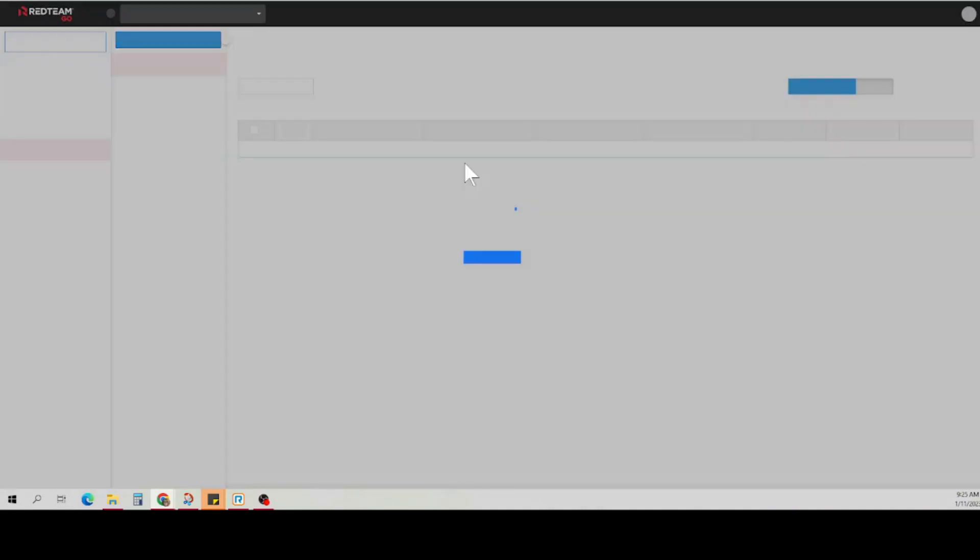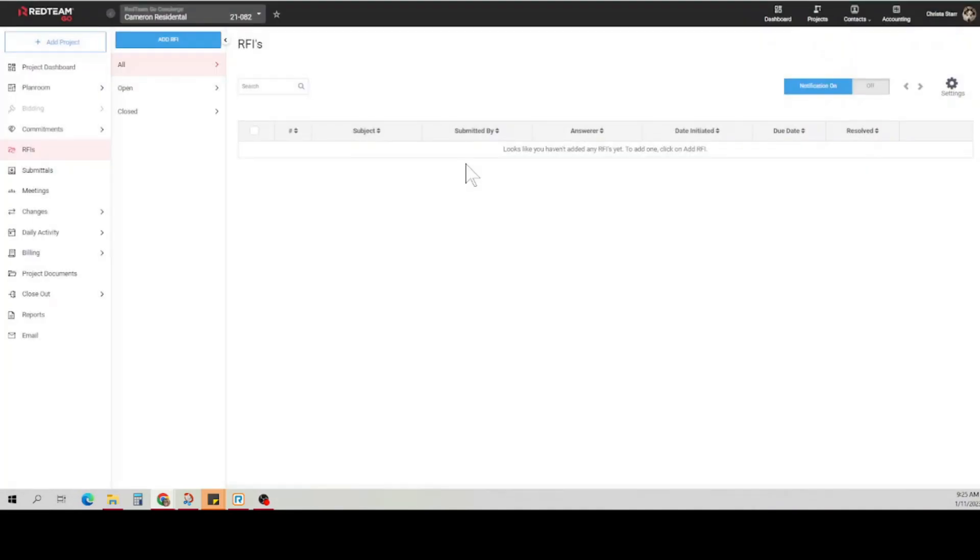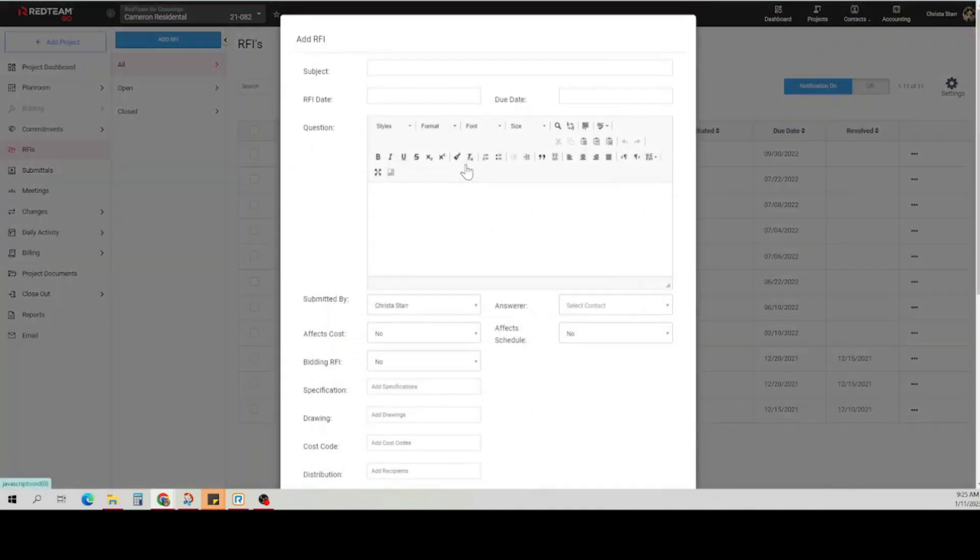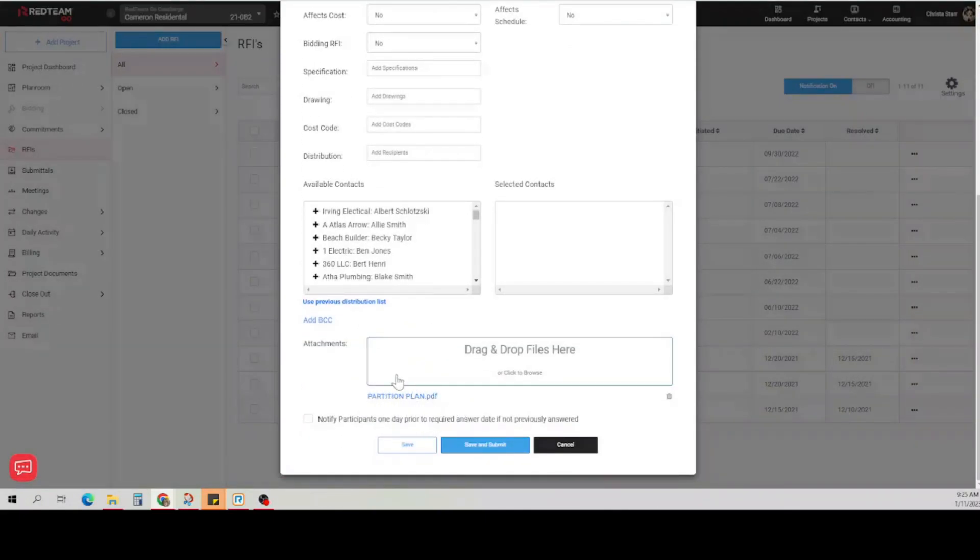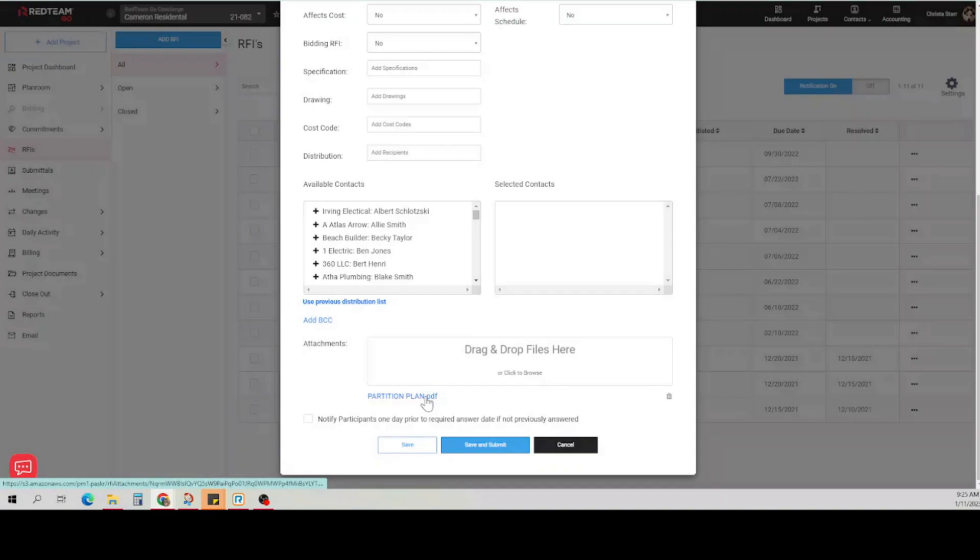This is going to open a new RFI form for you to fill out, and you'll see at the bottom there is the drawing that you marked up. Once you've filled out the form, you'll click save and submit.